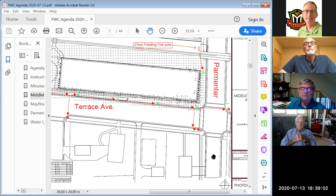How that's done, I'm not as worried about, whether it's a generator or running power cords places. I would go along with junction boxes on top of those bases. A, it protects the conduits that are there, covers them. B, it assures everyone that the wiring is still good, and that would be more Brian's concern than anybody's, I think. If the wiring fails, he'll be digging it all up and trying to figure out what's going on anyway. If you just put an exposed conduit on the ground, it becomes a tripping hazard. So I would go for the junction boxes, and putting a portable generator out there, no one will keep it fueled. There'll be complaints that the lights aren't on at night because somebody didn't put gas in the generator.